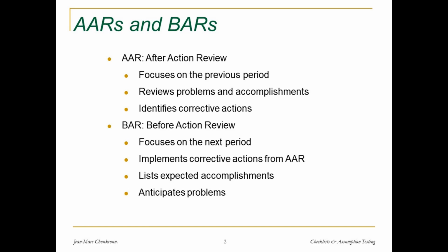After action review is actually a tool that was developed by the US military, where each unit, immediately after completing an assignment, meets at the first opportunity after the action has been successfully or not completed to review what happened. And the idea is to look at what did we intend to do, what did we do, what went wrong, what went right, and what changes do we need to make going forward.